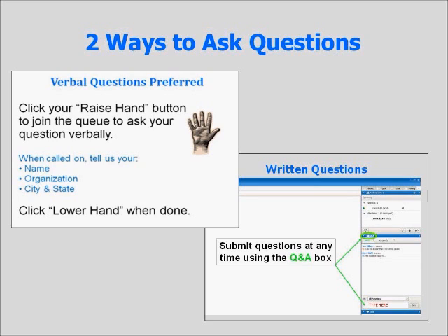Right. Sound right? You could retain ownership and just give them a right of access or option. You could give them an easement, or there's any number of ways, depending on who the developer is and how the agreement's set up, to give them effective site control without necessarily transferring title until some later point.